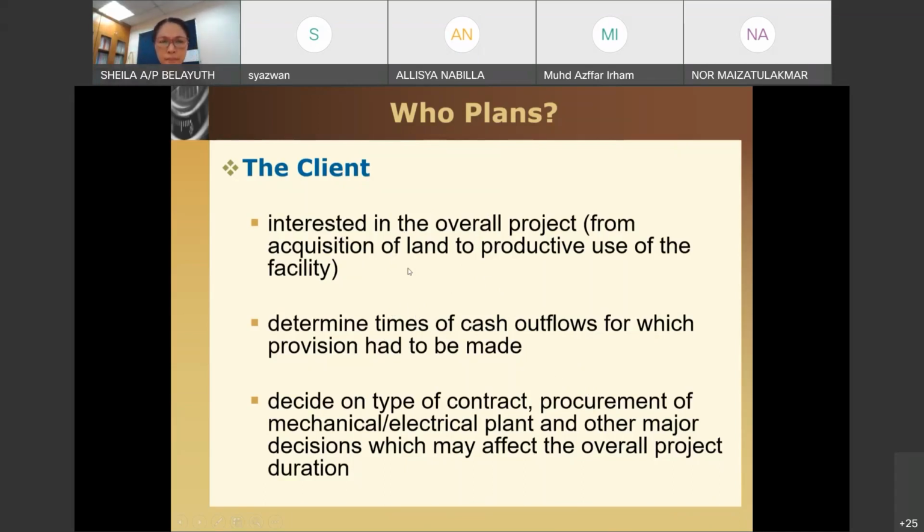So this is important, particularly towards the end of the month. Normally payment is provided maybe towards the end of the month or early of the month. Okay, so every month there would be progress provided by the contractor. So this month 10%, 12%, 13%, 14%. So payment would be given to the contractor based on the percentage that has been more or less estimated.